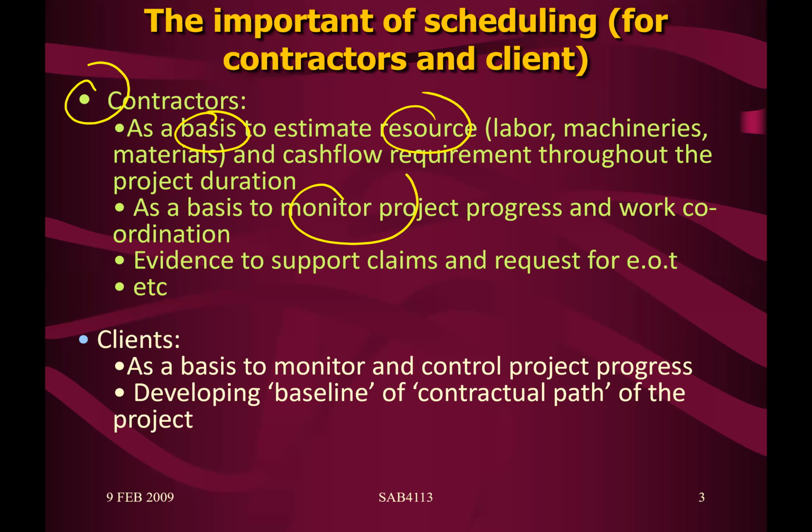Basis for monitoring. Okay, for sure, the contractor is the one that prepares the S-curve. Then they will submit to the client. The client will approve the similar S-curve, so that everybody will read the same KPI. And you know what? Why is it so important? Because the contract can be terminated once the contractor is running late by maybe 20%, or even maybe 30% according to a contractual document. We need to check those things. So that's why it is important to set some kind of standard so that the client and contractor will have the same measurement.